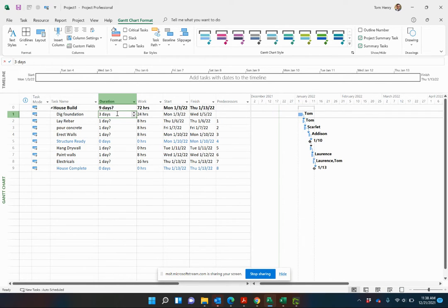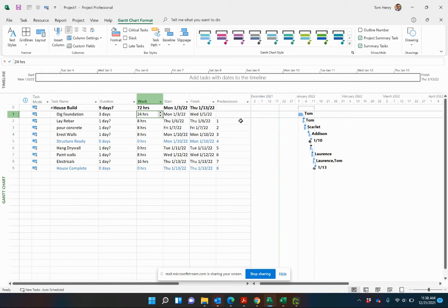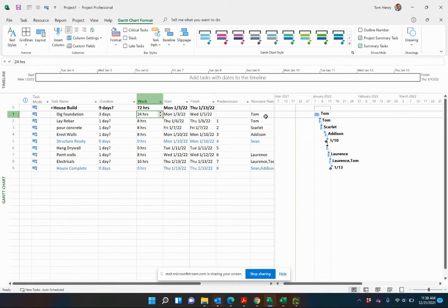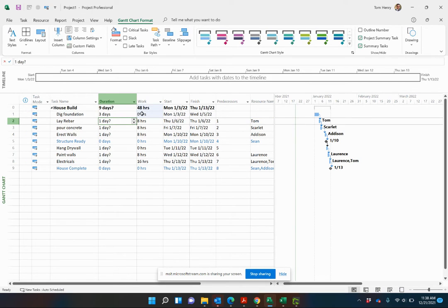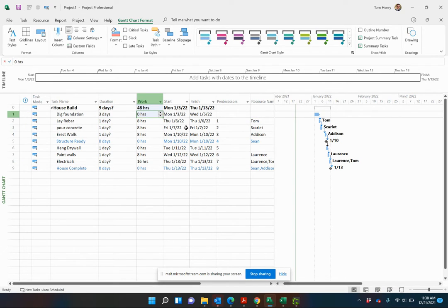You can see three days, 24 hours. That's with one resource. If I actually take that resource off of the task, you'll see the work goes down to zero hours. That's because no one's working it. It's just a duration. There's no work going on.